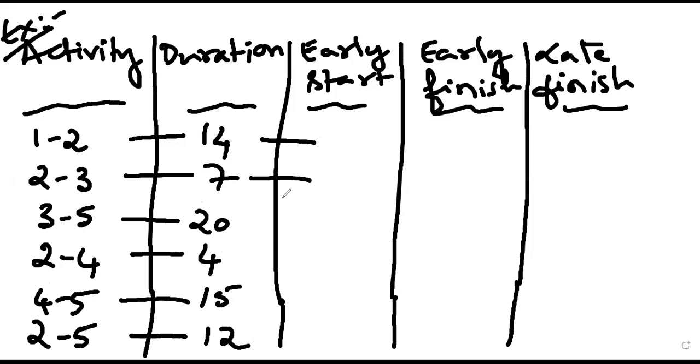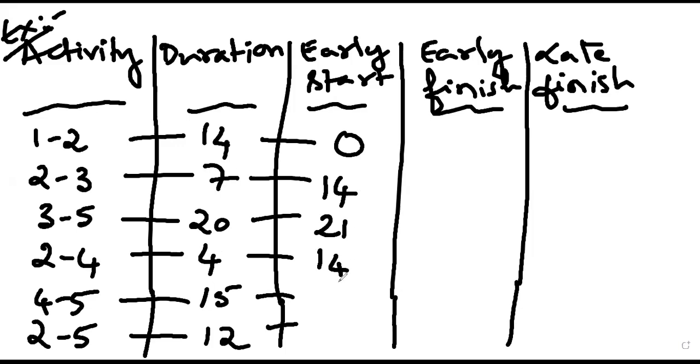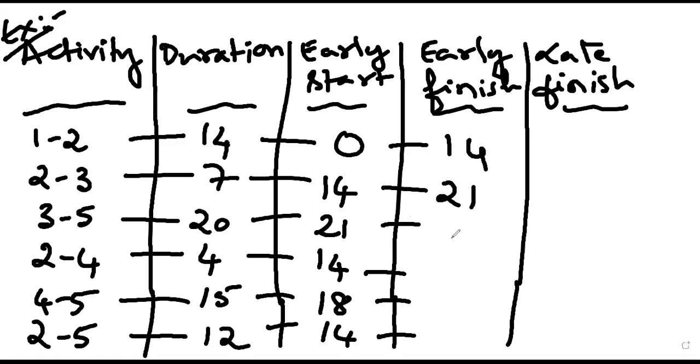Early start: 0, 14, 14, 21, 14, 18. Early finish: 14, 21, 41, 18, 33, 26.